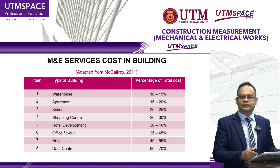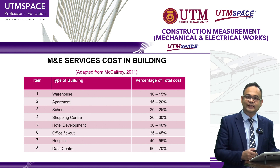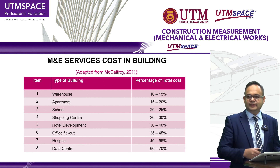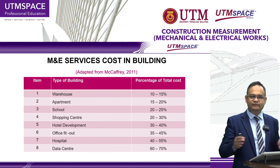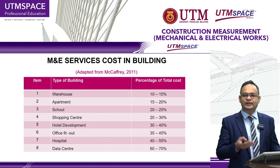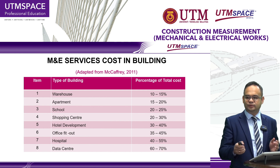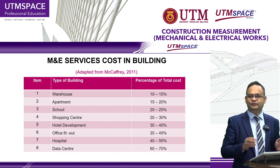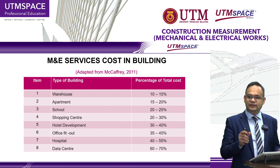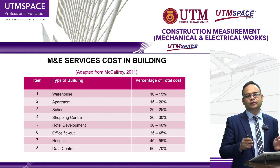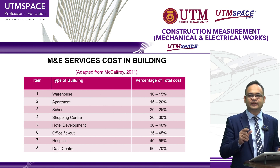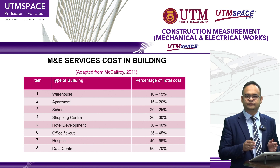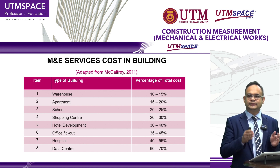Based on our research, adapted from McCaffrey in 2011, you can see in this table — numbers one to eight — the average cost of M&E services in buildings. For example, in schools the cost of M&E is about 20% to 25%. For hotel development, the cost is about 30% to 40%. Hospitals are 40% to 45%. And for data centres, especially telecommunications data centres, the cost is about 60%. This is quite a huge amount of construction costs in the building sector.